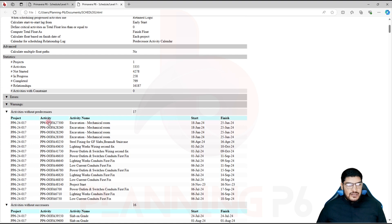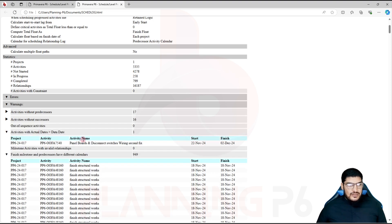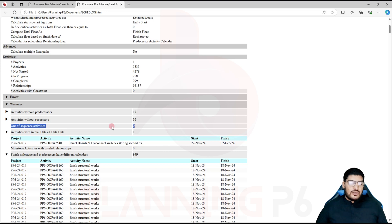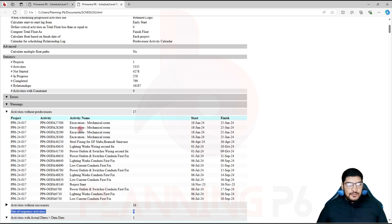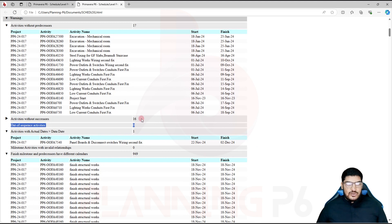In the log you can now see: activities without predecessor are shown as open-ended, and activities without successor are also listed. But now look — out-of-sequence activities have been fixed. As I mentioned, if you want to fix out-of-sequence activities manually it is fine for small numbers, but doing 352 manually would take too much time. For the remaining open-ended activities, predecessors are only 17 activities and successors are 16 — you can fix those easily by finding their activity IDs.